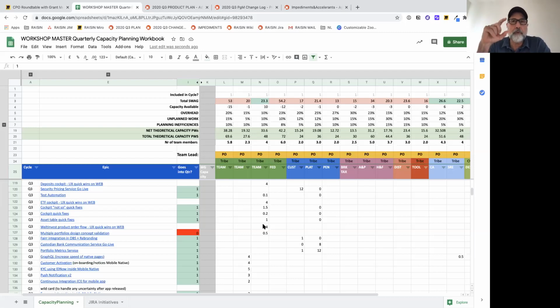We typically go through 2 or 3 iterations about 3 weeks before the end of the quarter. That's our planning cycle. And then what happens is these numbers up here go red, and they should go slightly red. And once they're red, no more demand. Or you start doing the horse trading and you're saying, well, that's not as important. And so those conversations are actually forced.